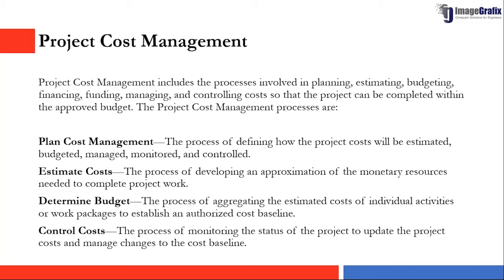Apart from that, all other cost related processes such as issuing purchase orders or contracts, invoices against these contracts, as well as your payments for these invoices, everything is tracked outside of P6, not in P6, right? In P6 we are managing our resource cost, and it is sometimes very difficult to manage cost in P6 for hundreds or thousands of activities.